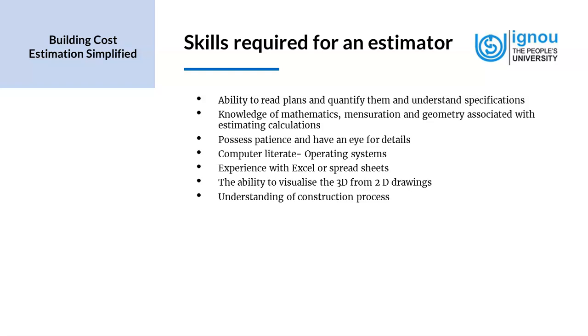If we are, say, making a foundation, then first we have to do the excavation, then the PCC, and then the RCC, etc. And so this process is important, not just the process, but how to do it. That's also important for the estimators to be able to understand the quantity which is to be taken, and also the material that is to be applied in a particular situation.